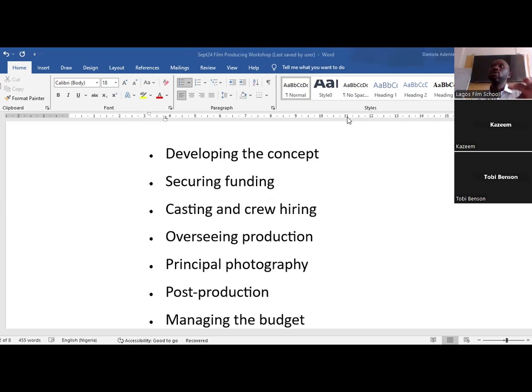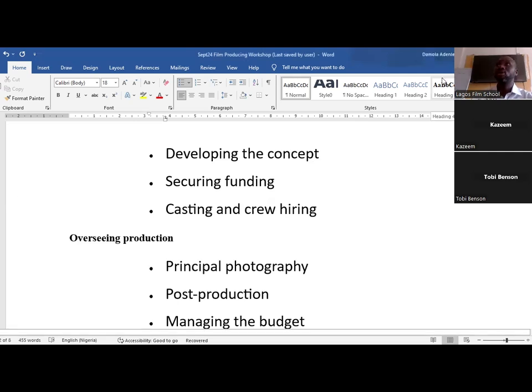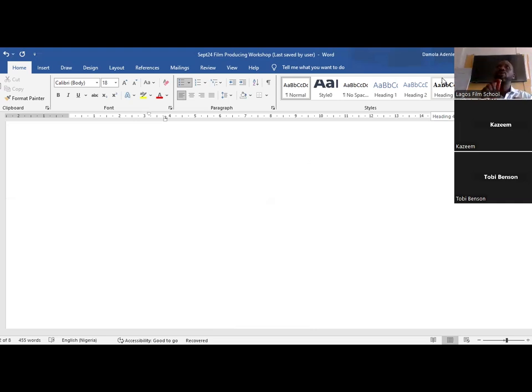So say you've broken down your script, you've estimated that you need 3.5 million to make this film. You calculated 700,000 for hotels at 10K per room for 7 people for so number of days. When you finally get to start shooting during production and you get those 7 rooms for those 10 days, you get a receipt. You should have a production office, so to speak, where you have an accountant. There should be a production accountant who takes all the receipts and inputs them against the estimated budget.